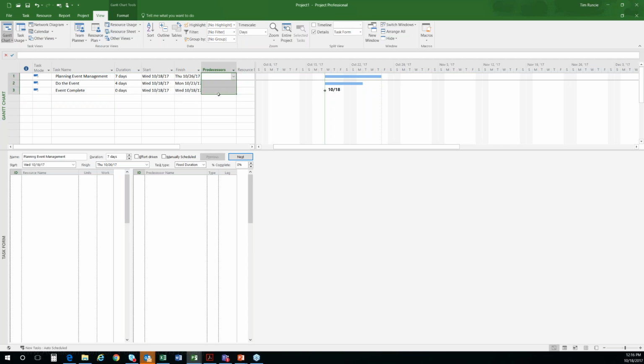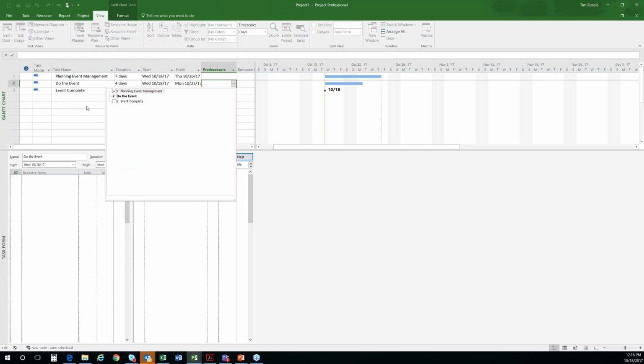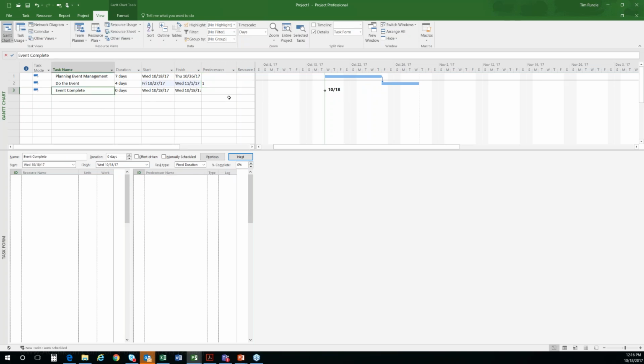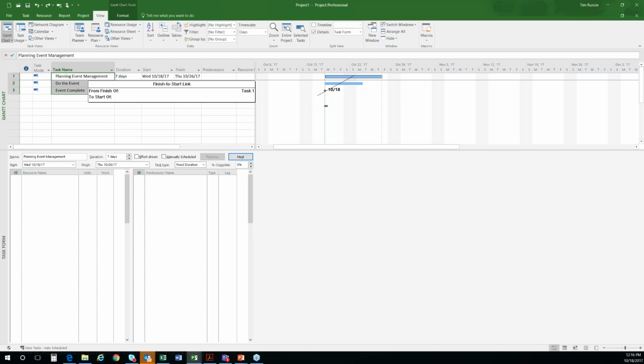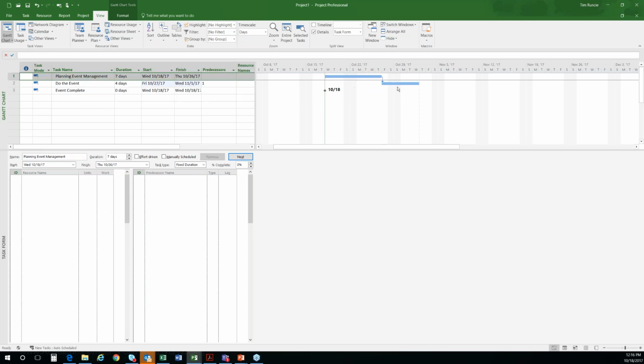So if we're creating these relationships or dependencies, I could say, hey, row number 2 is dependent on row number 1, and it makes a lot of sense that row number 3 should probably be dependent on row number 2. You can link these lots of ways. You can highlight them, and if you right-click, you'll see a little mini bar where you can link them. You can also put your mouse pointer in the center of a bar, drag, and touch the task that you want to visually connect. All of these are simply updating that predecessor successor column. And a best practice is to allow this to happen.